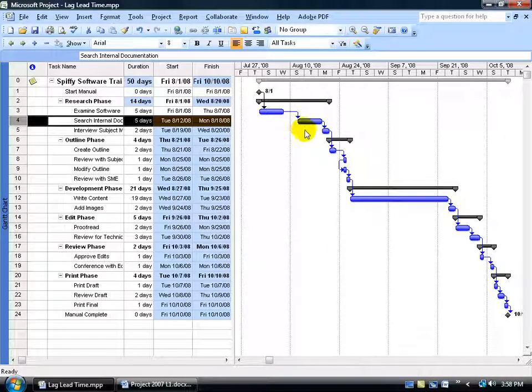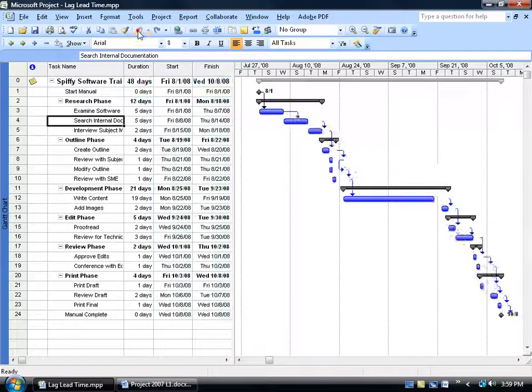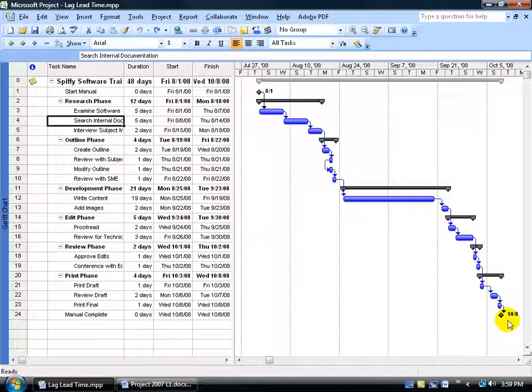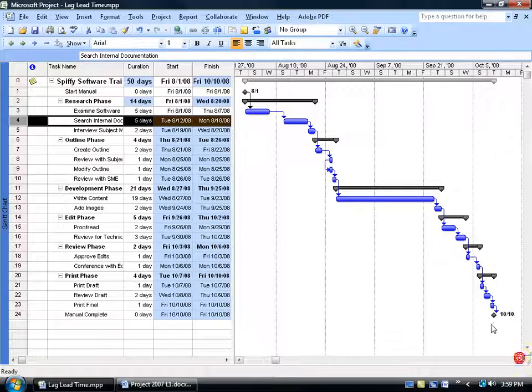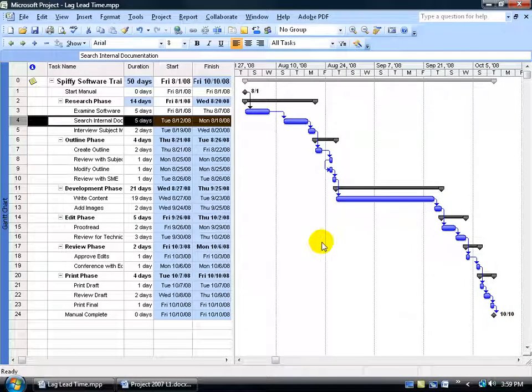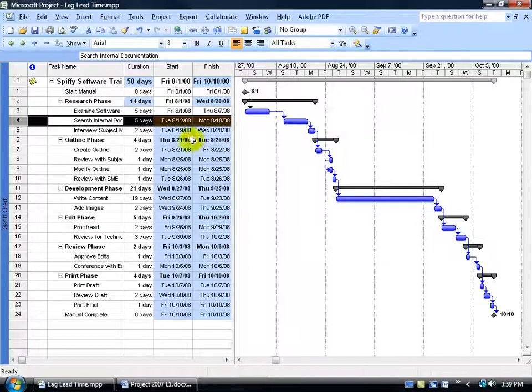And it pushes everything else out because of the delay, so no longer does the project finish on October the 8th. In fact if you hit undo, there's October the 8th, and I click redo, it's now October the 10th. Now here's another thought about lag time and even lead time.